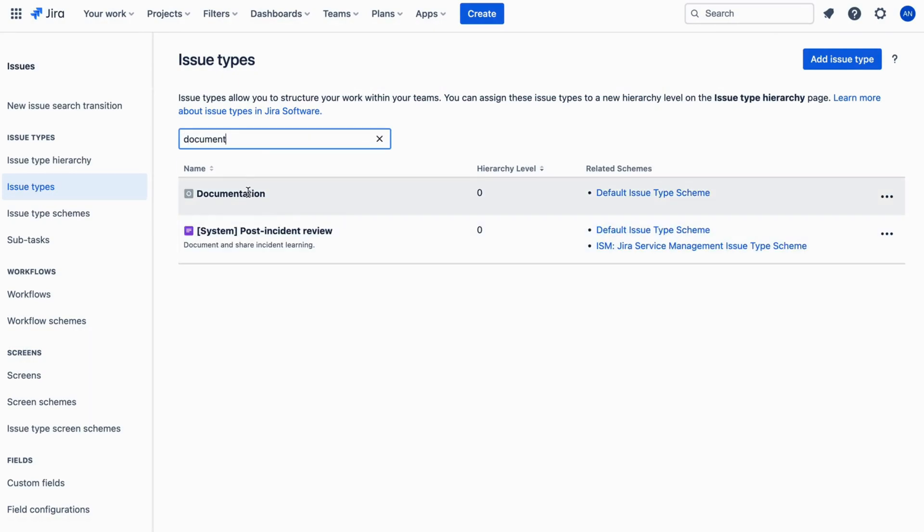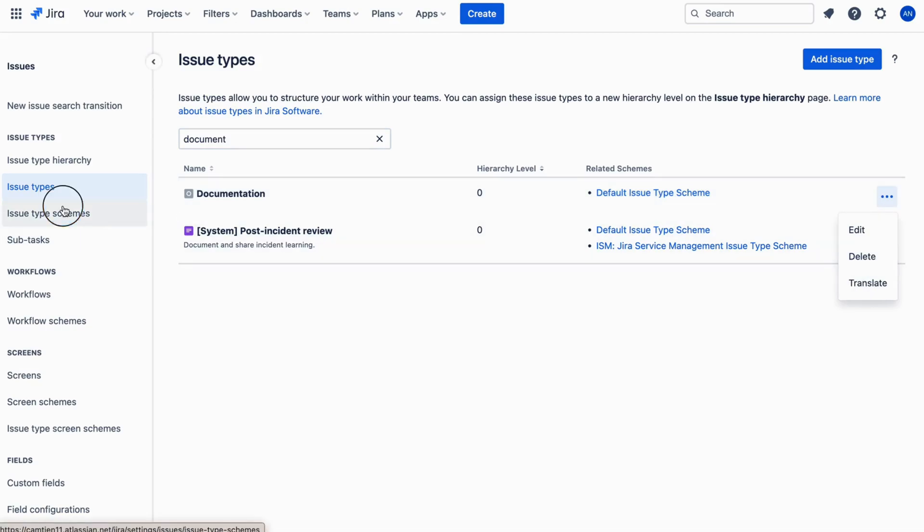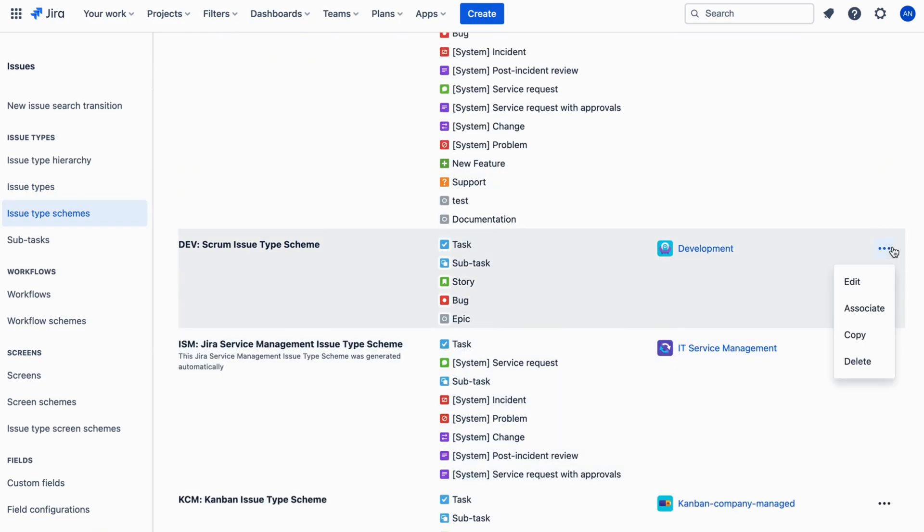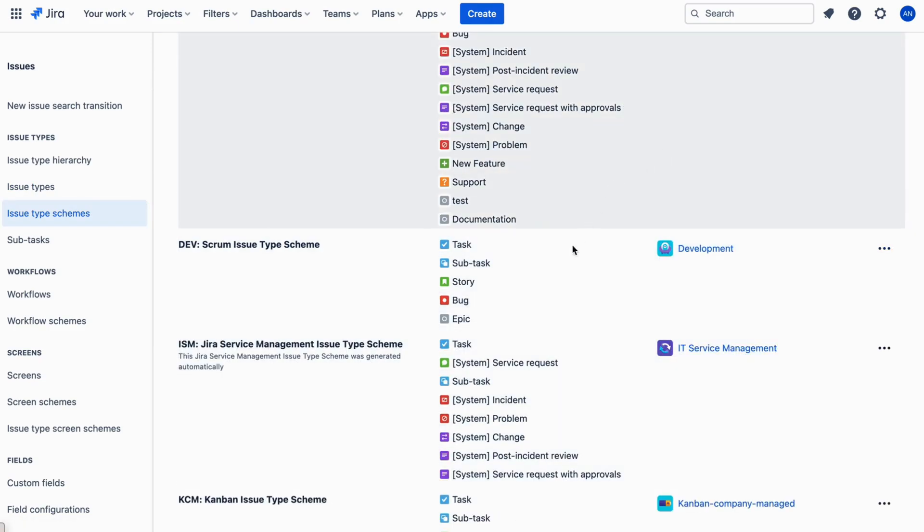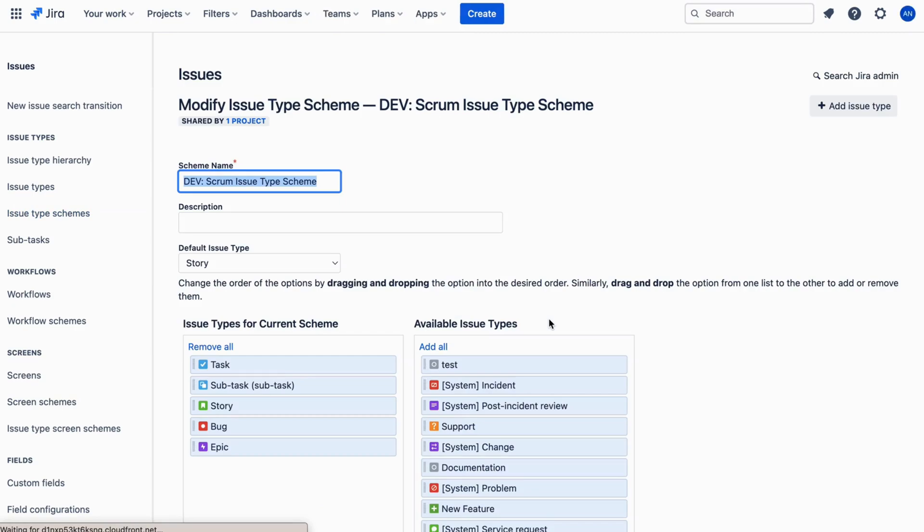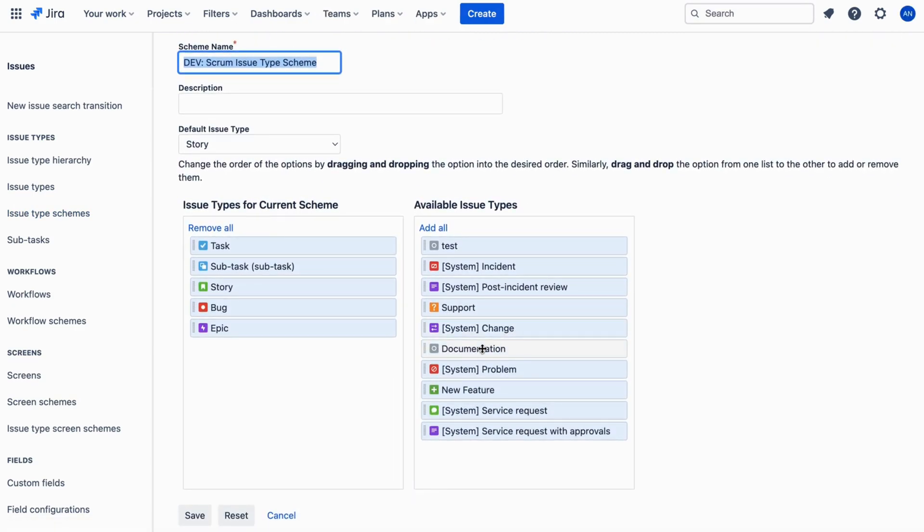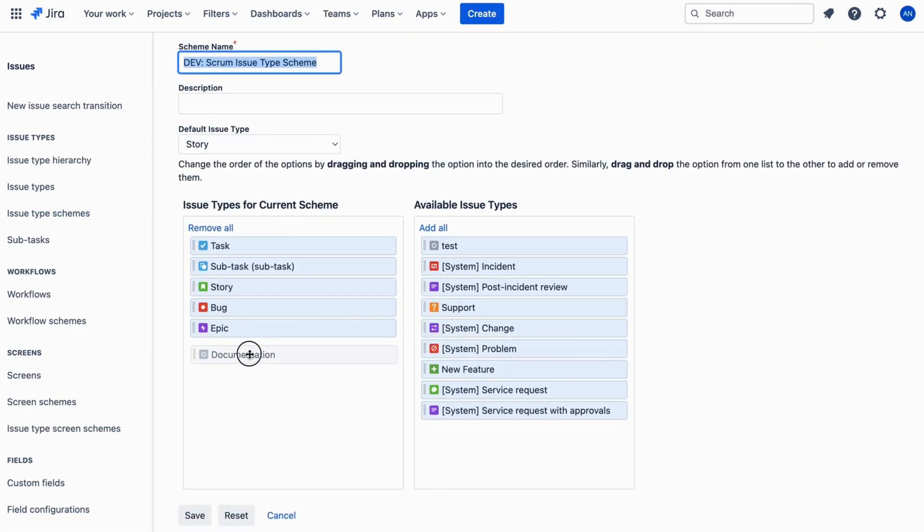After creating the issue type, you need to add it to Issue Type Schemes. Click on the Issue Type Schemes of the project. Click on the three dots in the Actions column. Choose Edit, Drag and Drop Issue Types in Available Issue Types to Issue Types for Current Scheme and Save it.